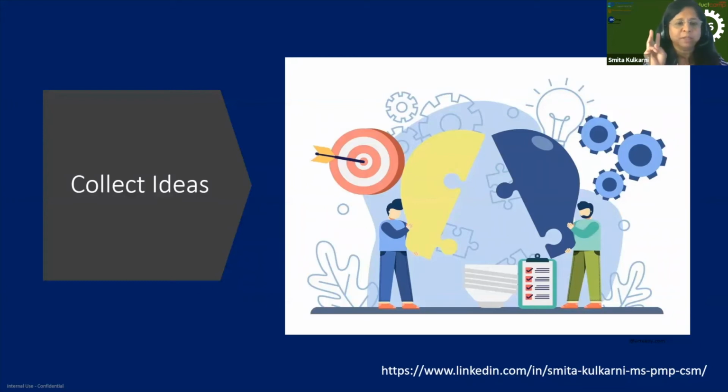And we came up with exactly 3 things, in cooperation with all the customers and all the management teams, understanding that these are the 3 things we want in our product. And that becomes our first version, that is the MVP.